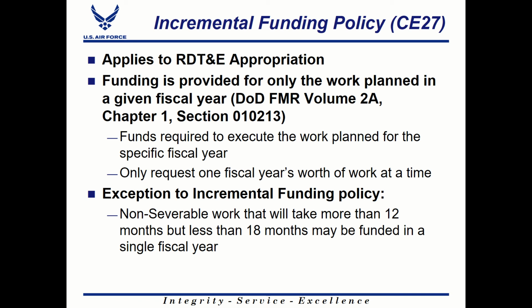For incremental funding, the policy applies to the Research Development Test and Evaluation Appropriation, or the RDT&E appropriation. This is the appropriation that's typically used in the system design and development phase of a program. So in this phase, the funding is being used to do research, to develop some technology or develop some system, or test and evaluate a system that's been developed. So in this case, the funding is provided for work that's planned in a given fiscal year.